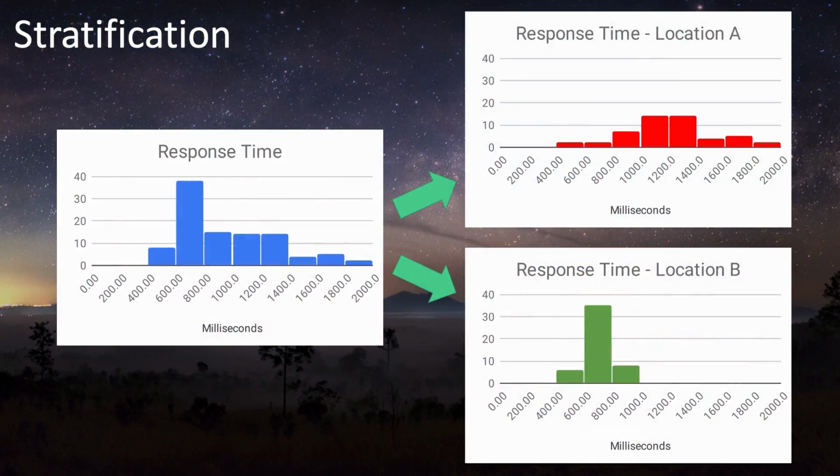Now we come to stratification, which is when you have multiple histograms merged into one. You didn't think you had multiples when you started, but when you graphed the data using a histogram, it showed multiple peaks or a comb, or something that made you suspect that you have two or more data sets that you thought were the same, but are somehow different. Or the distribution may not lead you to suspect multiple data sets, but they're there anyway.